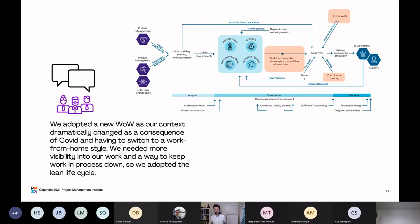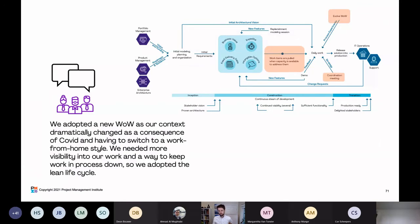The Disciplined Agile lean lifecycle is Kanban-based. Work items are pulled when capacity is available to work on them, which keeps work in process down. They also have a work item pool where they can categorize work into different classes — by business value, expedite, fixed delivery date, and so on. They now have a daily coordination meeting, which brings visibility into what they're working on, and they're also starting to do retrospectives and process improvements through evolving their way of working.